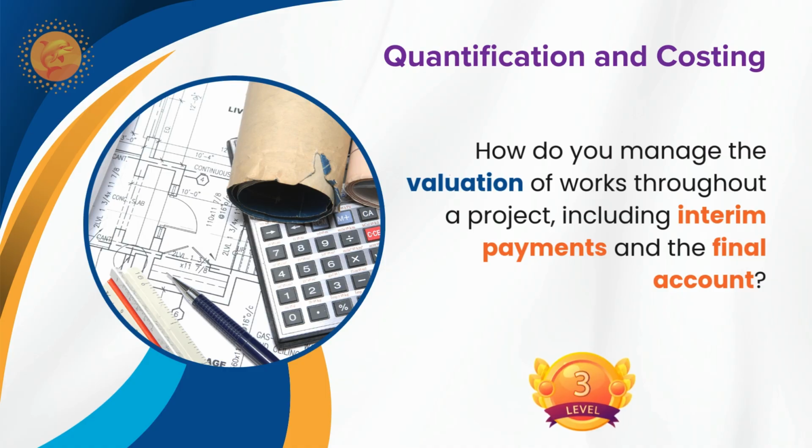During the course of this whole month, I will maintain the record for the RFA and approved shop drawings, and if there is any NCR, I will instruct my project manager to take corrective action and close that NCR. In that way, I compile all the measurements, and in the next month I submit the IPA.